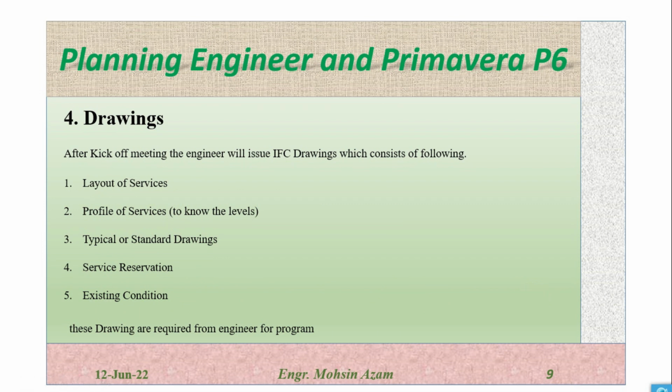Drawings. After the kickoff meeting, the engineer will issue IFC drawings, which consist of the following. So when the kickoff meeting is done, the engineer should issue IFC drawings, which is issued for construction, which consists of the layout of all the services. If it is infrastructure, in this case we will discuss infrastructure projects.